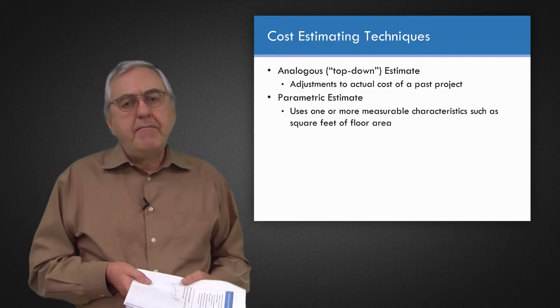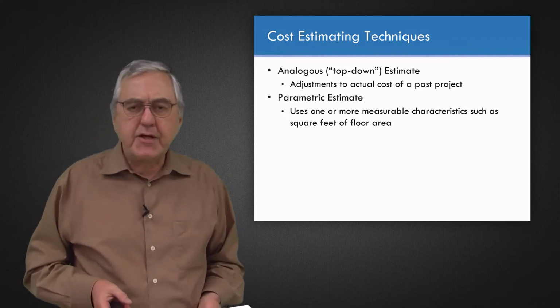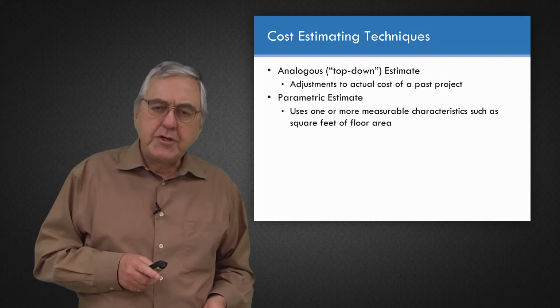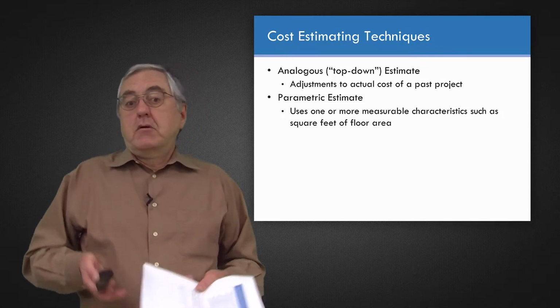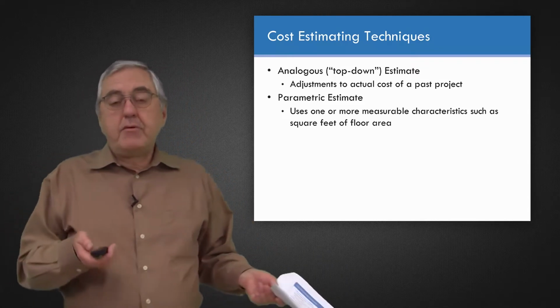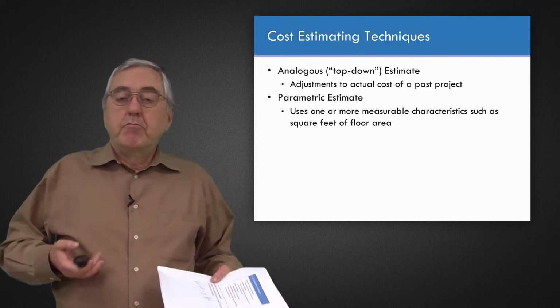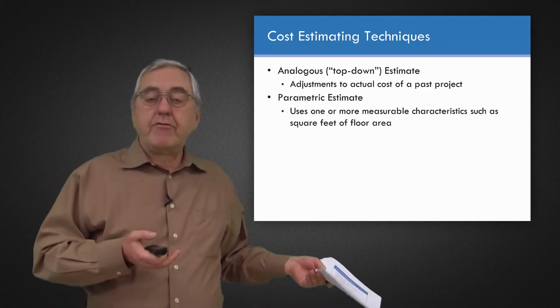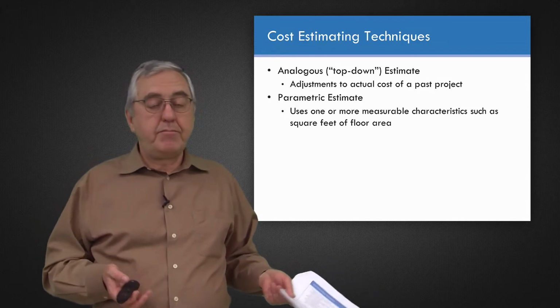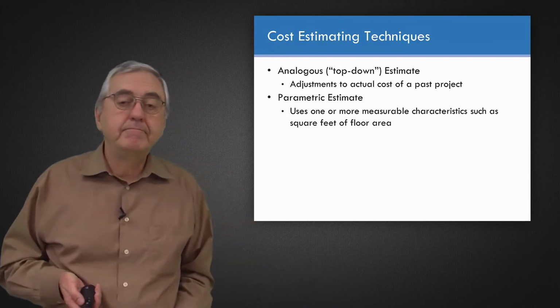Or any other time when there's some measurable characteristic that you know early in the project that defines how much the project will cost. For example, in ore processing, so many dollars per ton processed through the process plant in a period of an hour.